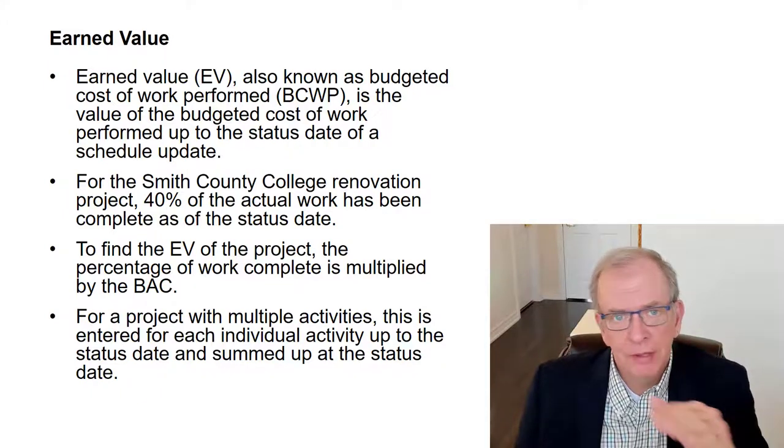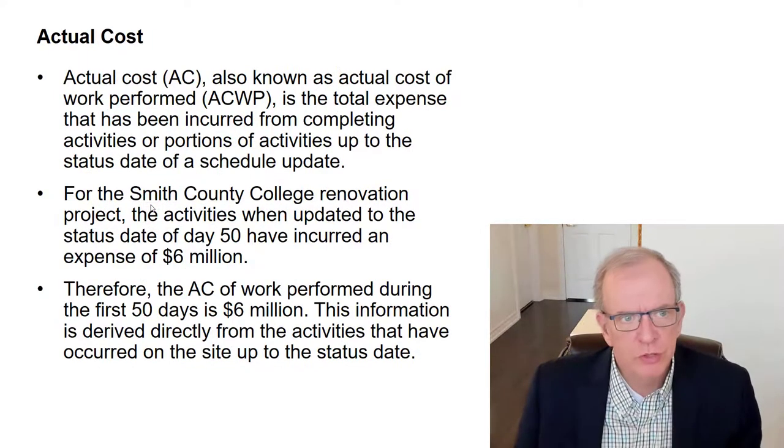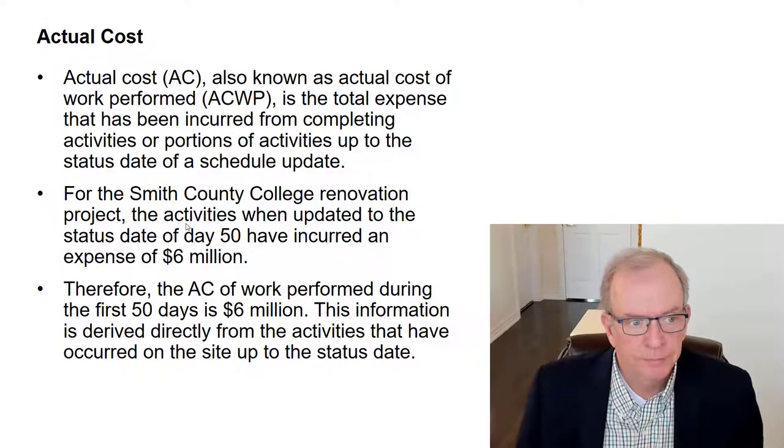Like I said, it was evenly loaded across, but we're only at 40% performed. So very much like that chart I showed you just a few slides back, we're actually over here, at 40% of the work performed. We had planned way back here to have that done, but we're over here, and we've only got 40%. We're not at 50% of the work performed.